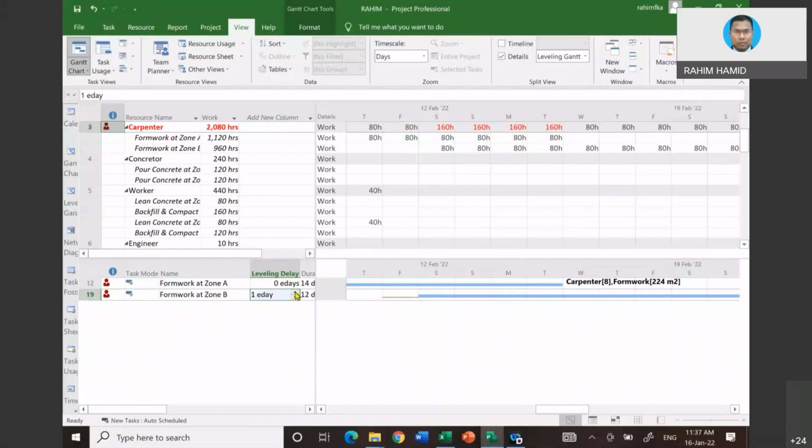So you need to shift by 5 days. Click that. You see, the red man basically disappears. So it looks like you resolved the resource conflict. Okay, but then, solving one problem will create another problem.